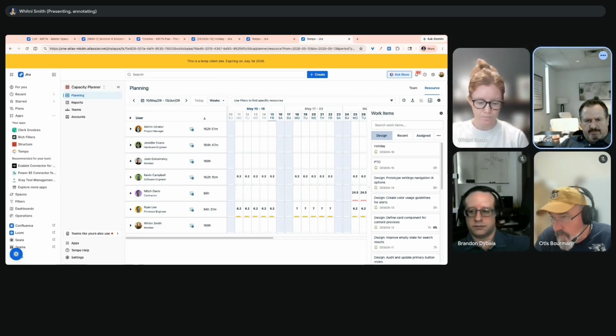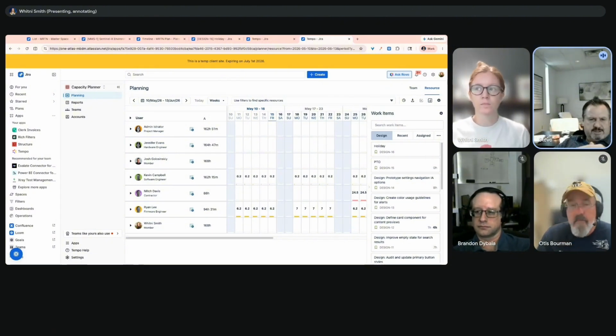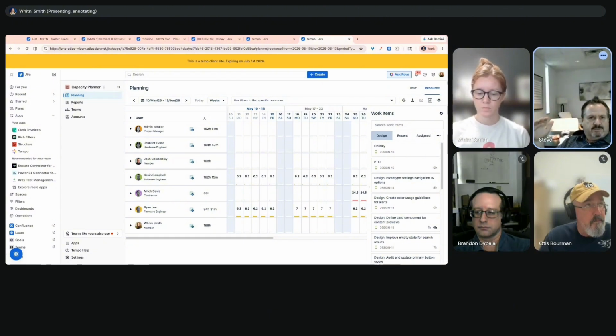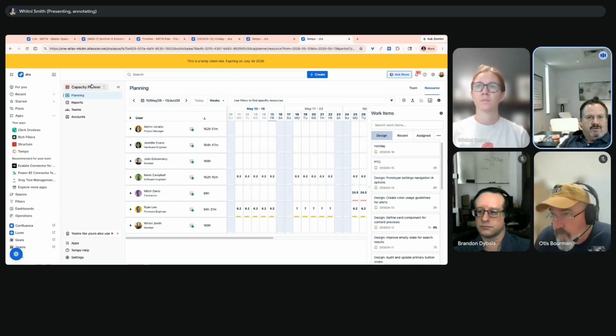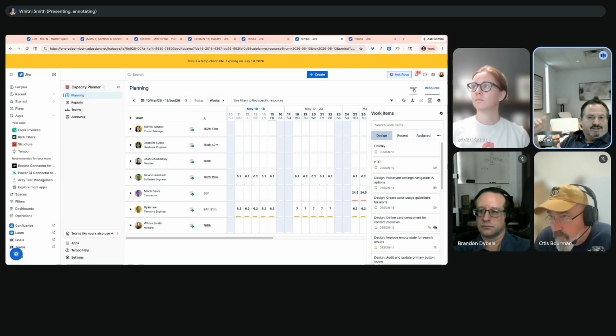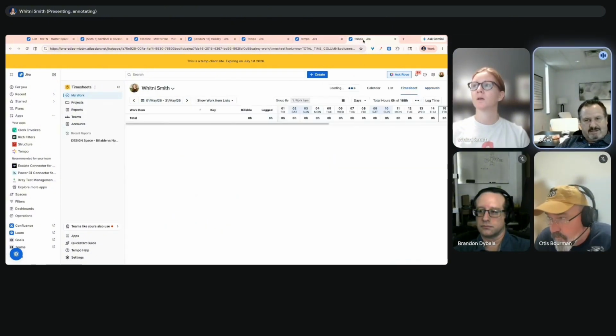Sure. So right now we have this concept of when we build up the quote or the estimate, we have Brandon has X many hours, Steve has X many hours, Bruce has X many hours related to this estimate. And then as we log time against it, what happens oftentimes is Steve goes way over his allocated time. And even though we're under our total cost budget, Steve has blown his budget, and now we're basically going to lose money, or somebody else has to get done faster. Right. Yeah, so that's the idea.